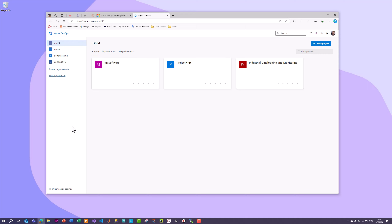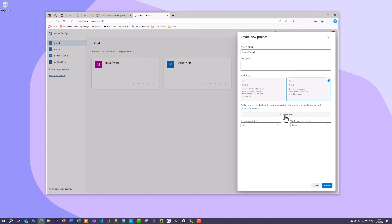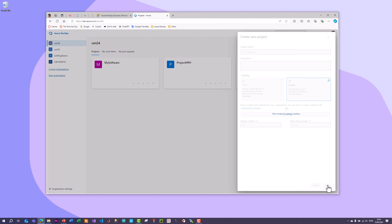Select your organization, and then click New Project. Specify a project name — I'll call it Scrum Project. Enter a proper description, select Private, and make sure to click Advanced. Under Version Control you only have Git, but in the Work Item Process it's important that you select Scrum. If you don't select Scrum here, you won't be able to use the Scrum method in your project. Then click Create and the project will be created in a few seconds.